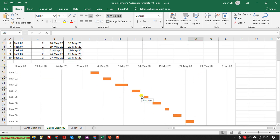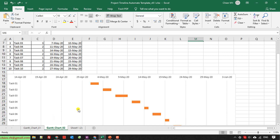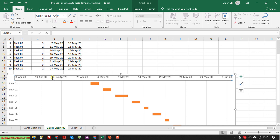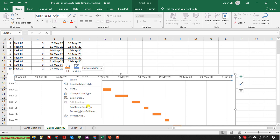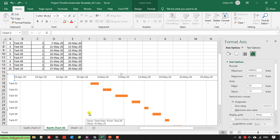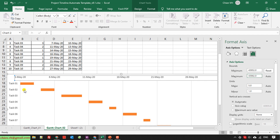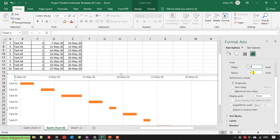Looking at the chart, we have some blank space in the timeline before the tasks. We need to remove that blank. Select the timeline axis, right-click, and select 'Format Axis.' The Format Axis panel shows Bounds and Units. For the minimum bound, I replace the value with the serial number I just wrote down. The blank space before the first task will be removed. I keep the major unit at its default and close the panel.